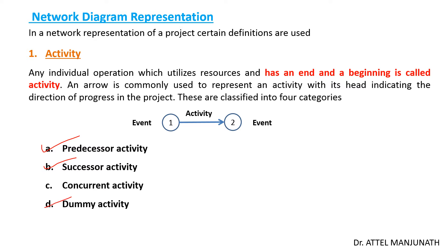The fourth type is the dummy activity. A dummy activity does not consume any resources — its resource value is considered as zero. The dummy activity is inserted in the network in two situations: first, to distinguish activities with a common starting point and finishing point, and second, to identify and maintain the proper precedence relationship between activities that are not connected by events.